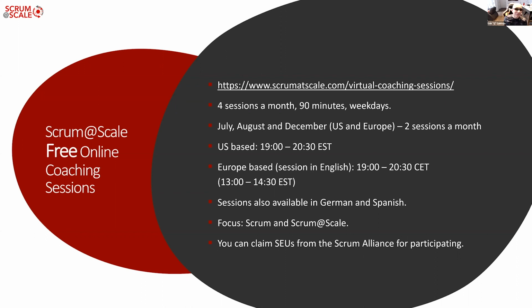I've done some with between 15 and 20 people. It gets a bit noisy, but you also get a lot of good ideas. It's a bit taxing when you are the facilitator with that many people, but they're very, very productive sessions. And then, of course, there will be another session to clean up the impact map. We first capture everything, and then we do some pruning, and we figure out what has value, what doesn't, and do the convergence or divergence as it is. But I would say ideally, less than 10 people is relatively easy to facilitate. More than 15 people gets a bit rowdy, but is still fun.